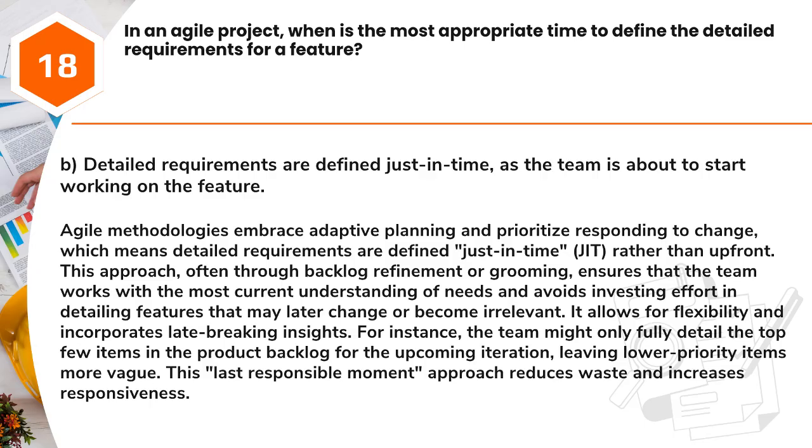For instance, the team might only fully detail the top few items in the product backlog for the upcoming iteration, leaving lower priority items more vague. This last responsible moment approach reduces waste and increases responsiveness.